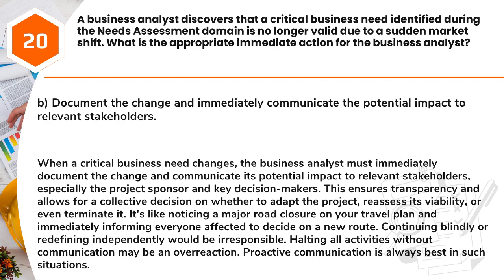Answer: B. Document the change and immediately communicate the potential impact to relevant stakeholders. When a critical business need changes, the business analyst must immediately document the change and communicate its potential impact to relevant stakeholders, especially the project sponsor and key decision-makers. This ensures transparency and allows for a collective decision on whether to adapt the project, reassess its viability, or even terminate it.